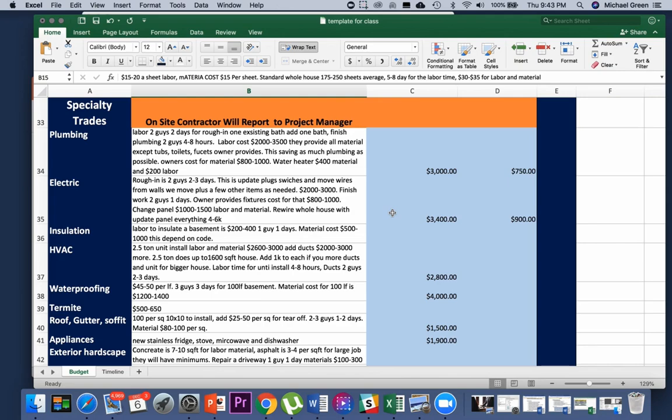And so, quick, easy ways you walk through. If the house looks like it needs more electrical stuff, maybe put it at $5,000. Less electrical stuff, and we can save some things. Maybe it has a good box and good plugs in the house, so it might be more around the $3,000 range. So $3,000 to $5,000 on the plumbing, $3,000 to $5,000 on the electric.